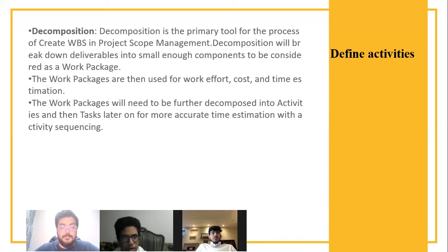Decomposition is the primary tool for the process of create WBS in project scope management. Decomposition will break down deliverables into small enough components to be considered as a work package. The work packages are then used to estimate work efforts, costs, and time.